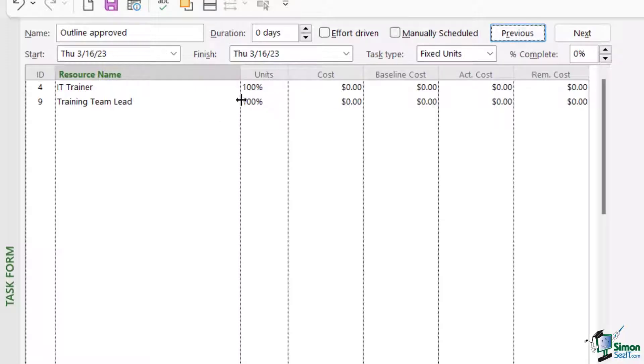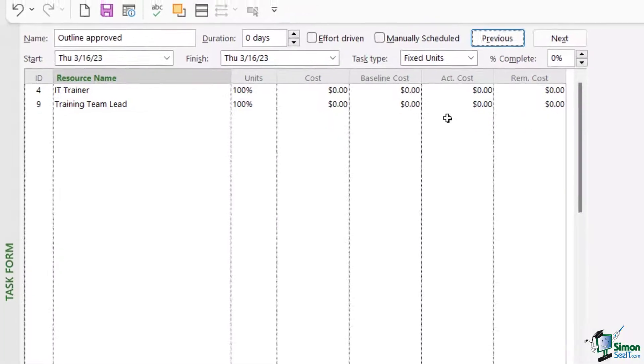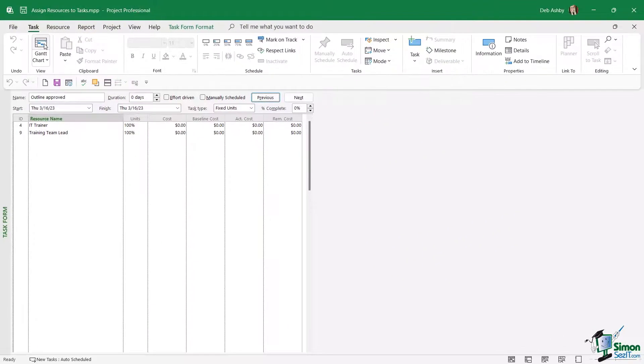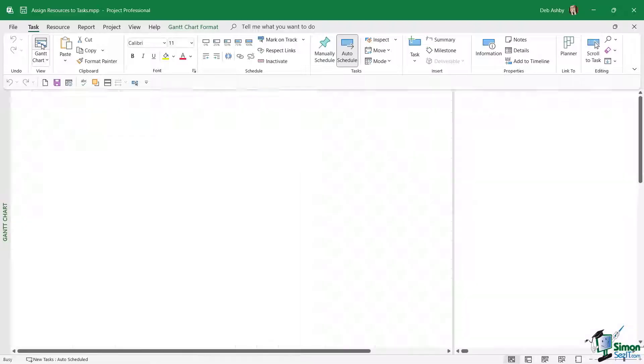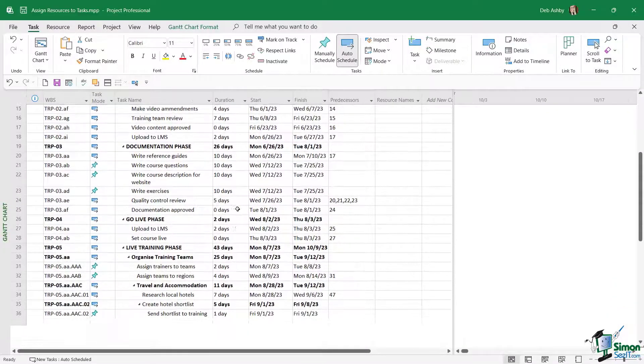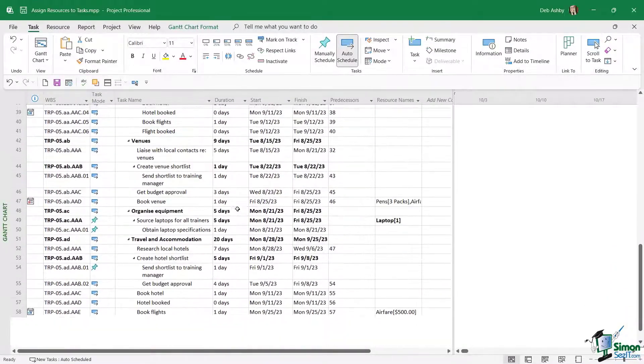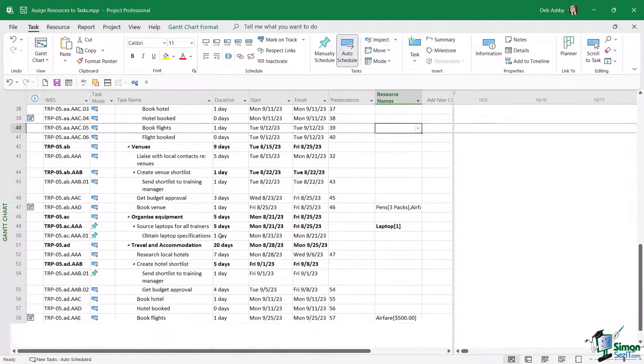When I click on the OK button, you can see it automatically fills in the units which is 100%, which means 100% of the training team lead's time is going to be dedicated to this task. And then we can see some of the other costs listed out here. Now I'm going to switch back to Gantt chart view very quickly and let's scroll down towards the bottom just here.